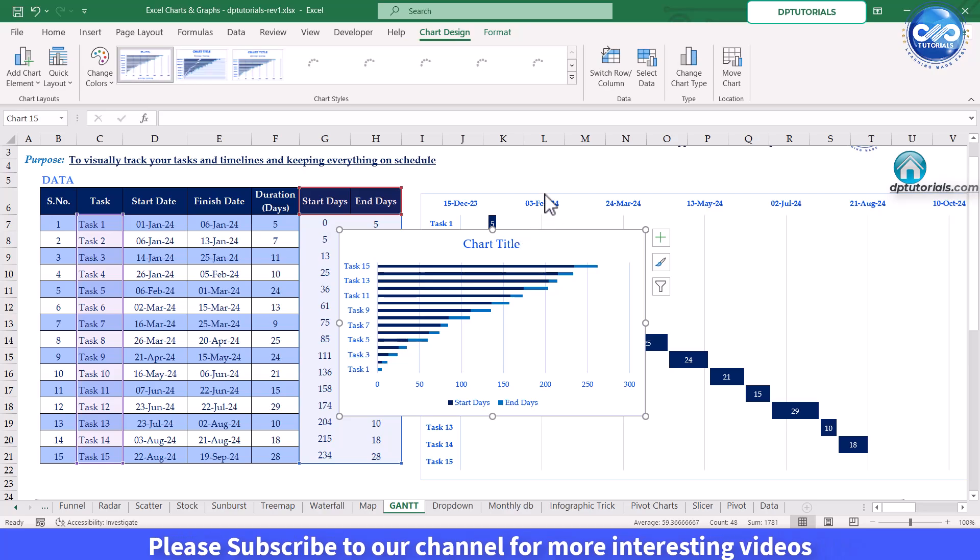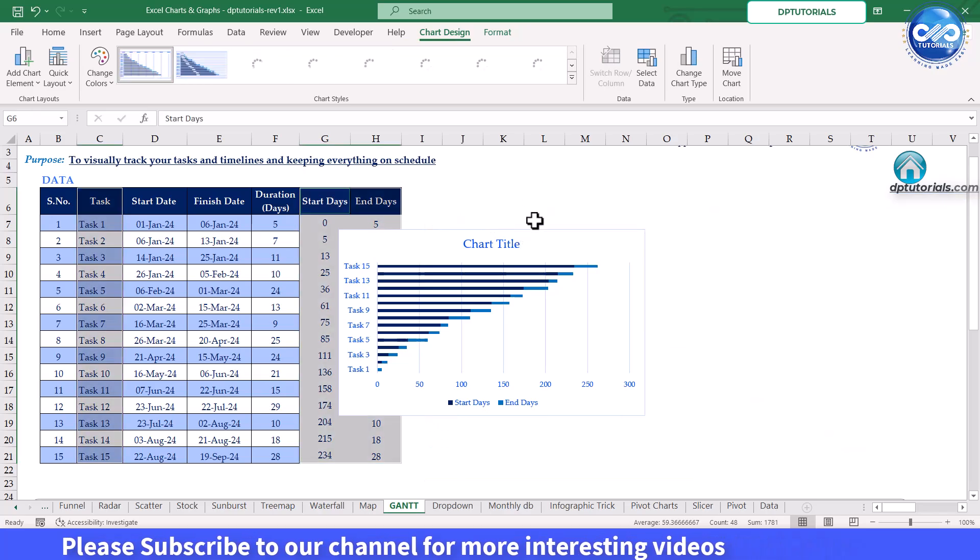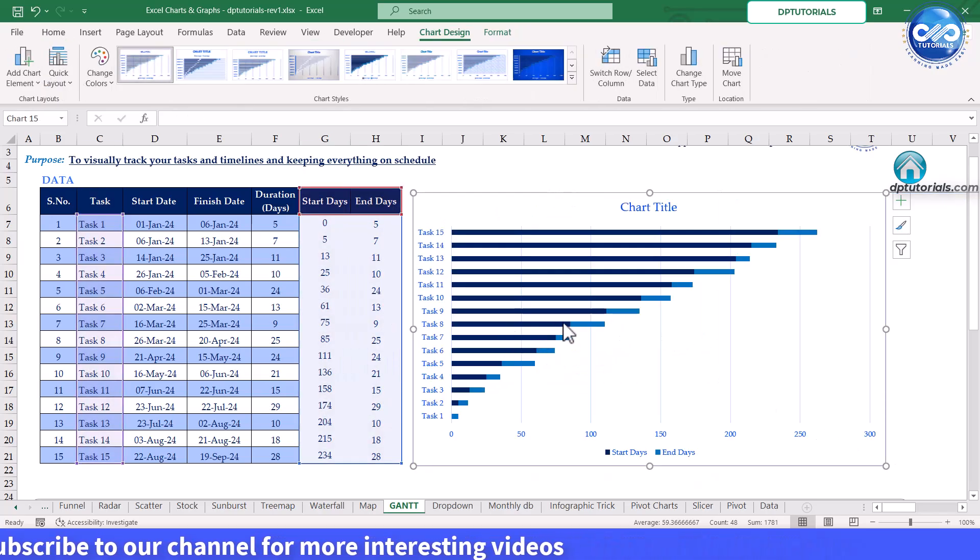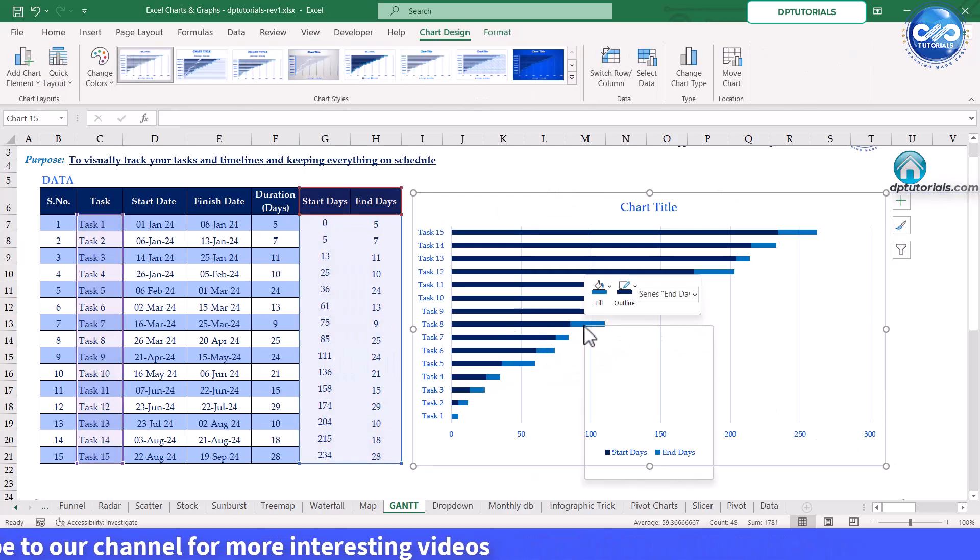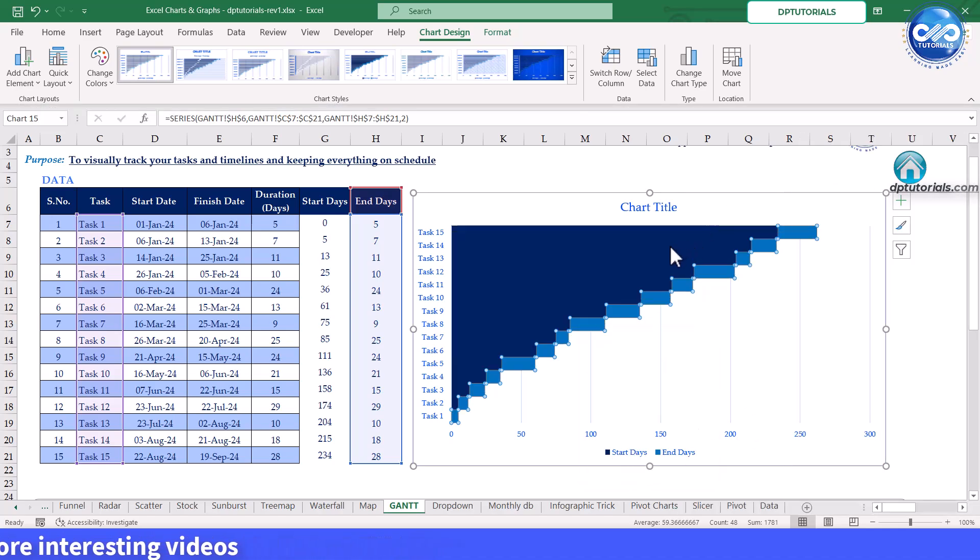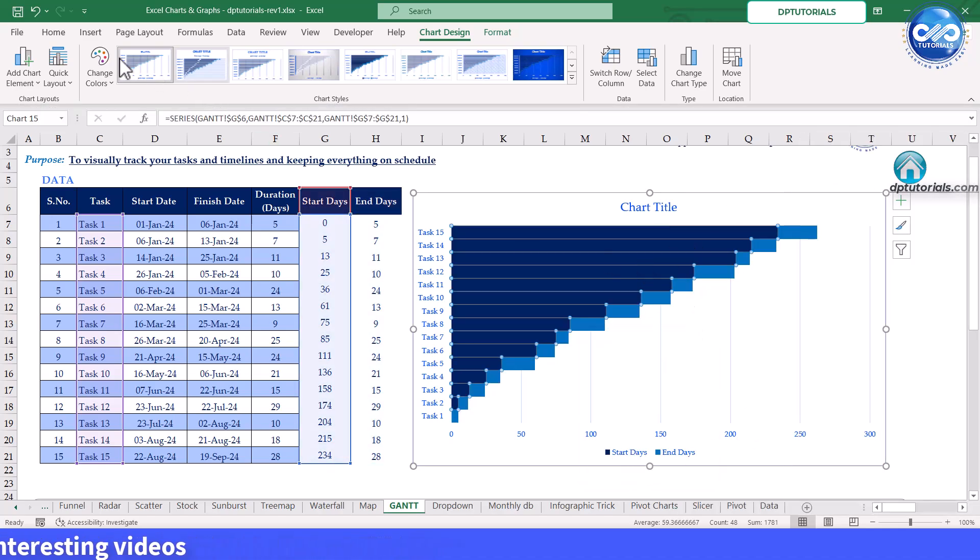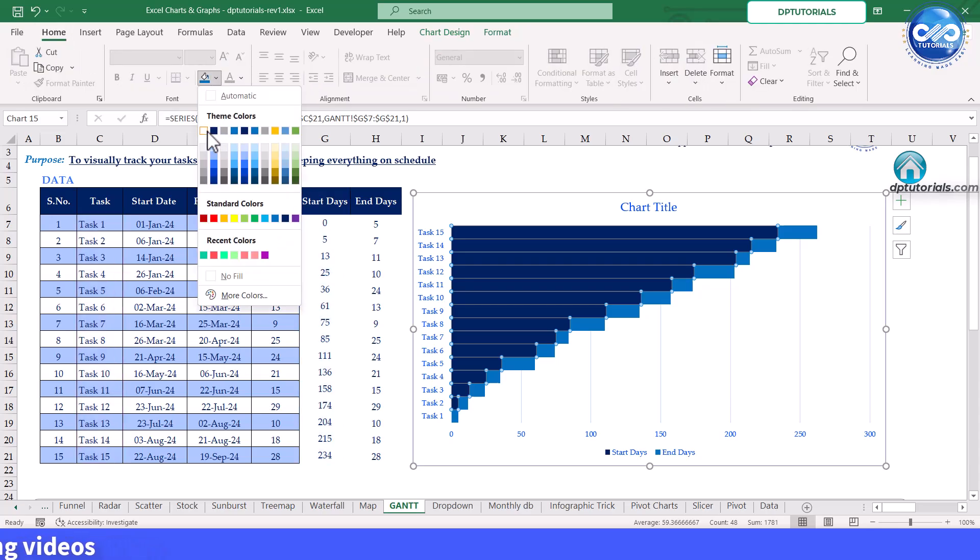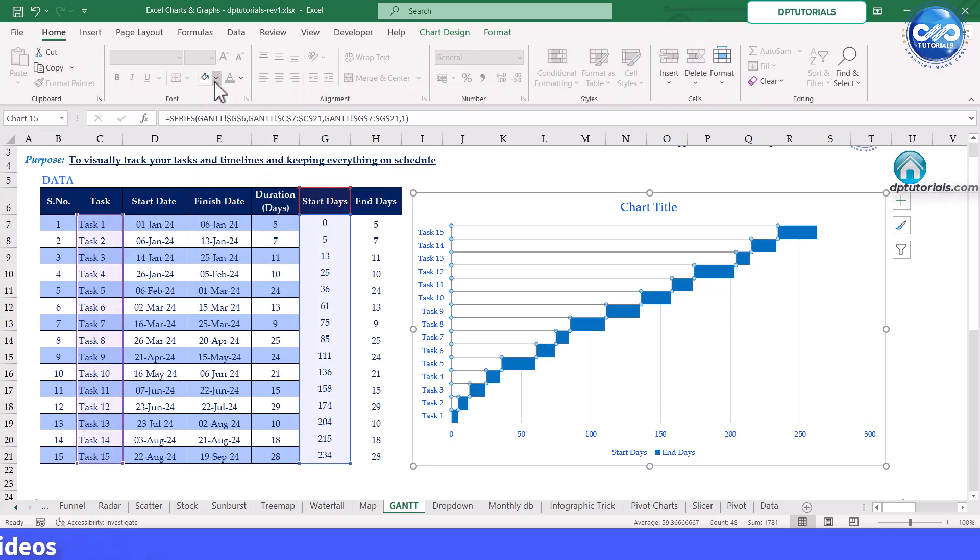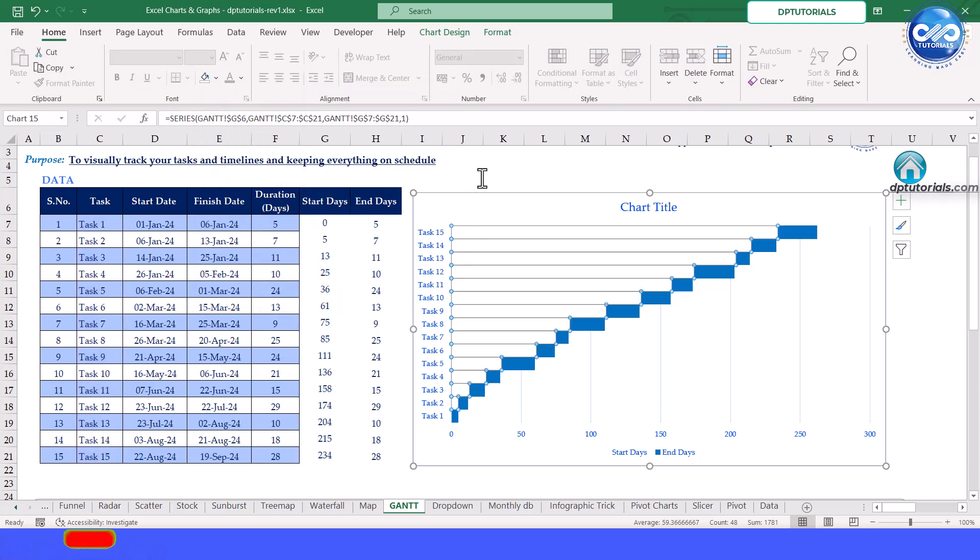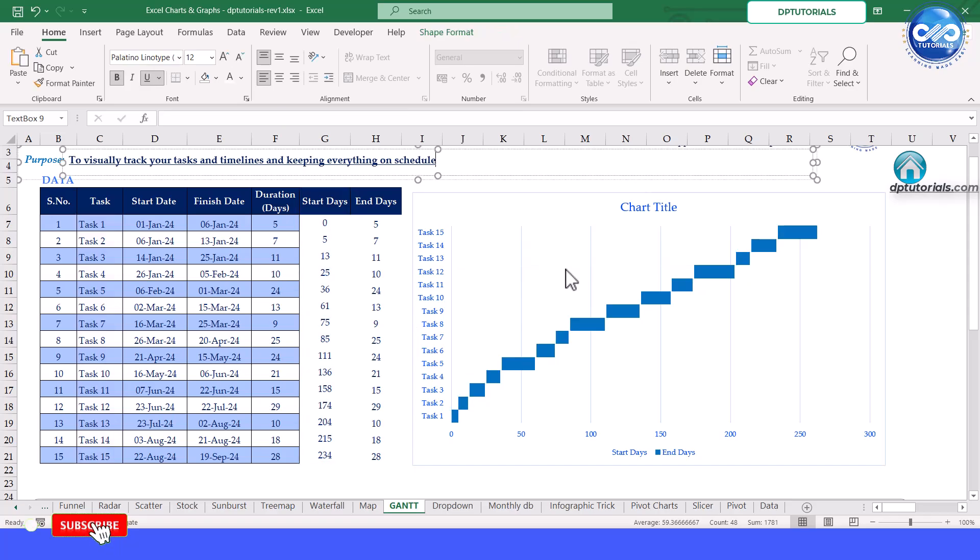Format the chart to make it look like a Gantt chart. Remove the gaps between the bars by setting the gap width to zero. Change the color of the start days bars to transparent or white, leaving the duration bars visible.